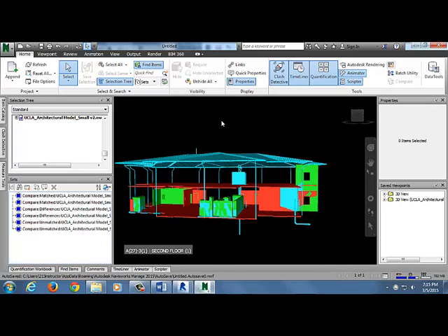And so you've put in how many total lineal feet of each wall, and so on. Then you get your updated model, and you can either update the changes the way I'm about to show you, or do your new takeoff. Either way, you're going to be exporting out and then dumping that into your estimating software. So either way, they're not linked.